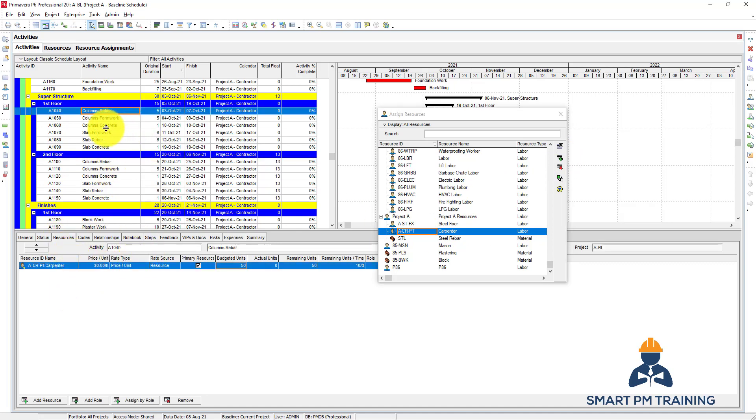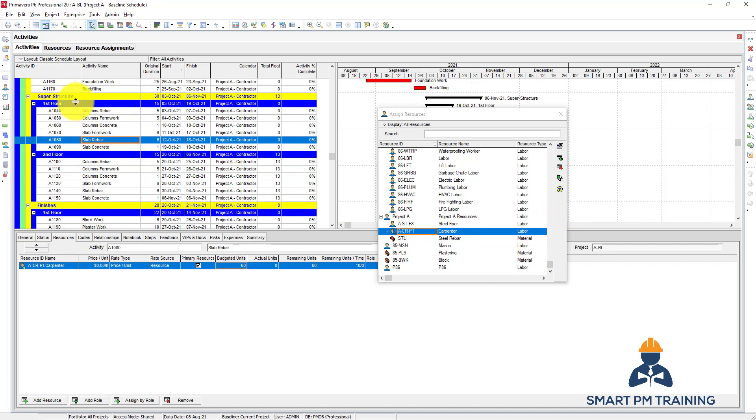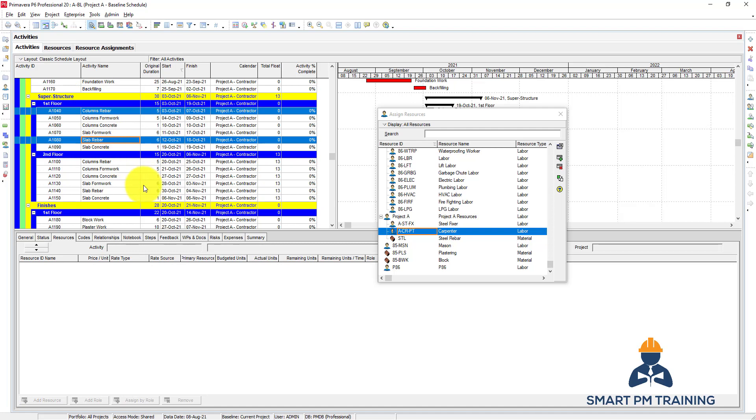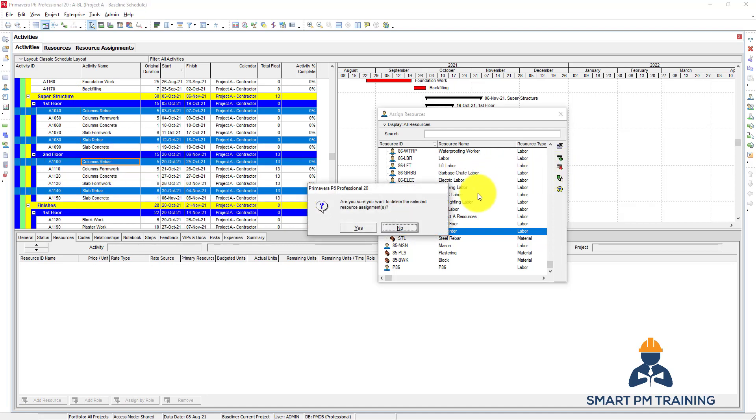Here, under the resources, you will find that all rebar activities are assigned, but I chose the carpenter. So it's a mistake - how can I remove that? You can select all and select remove from here, the X symbol.